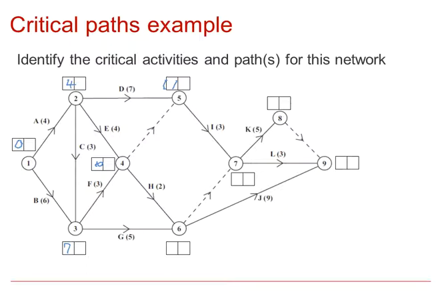And then considering node 6, that will be a 10 plus a 2, which is the same value actually as the 5 plus 7, so a 12. Node 7 will be either 11 plus 3, 14, or 12, or 14 is the larger, so that becomes a 14.